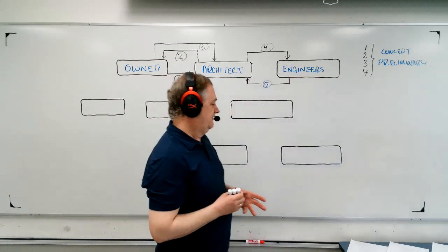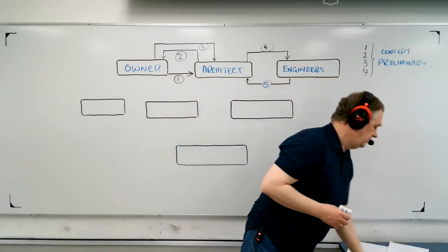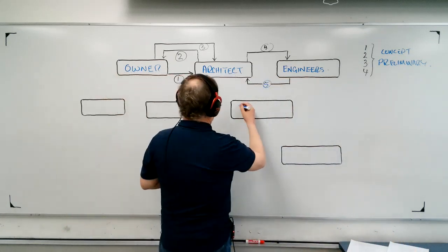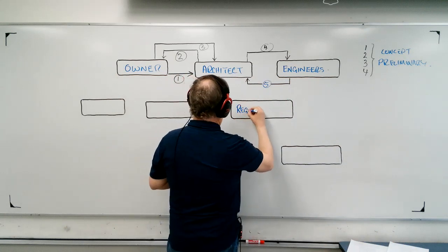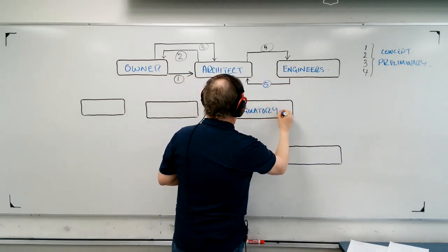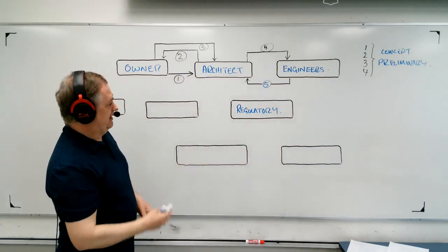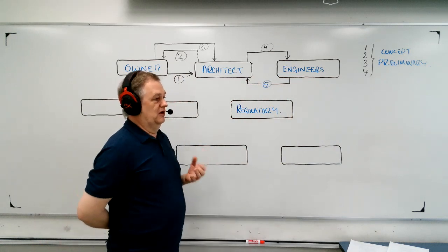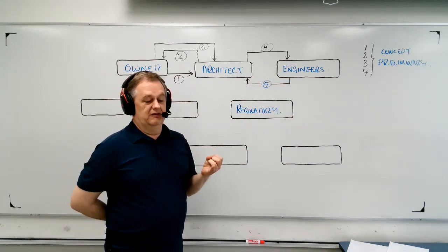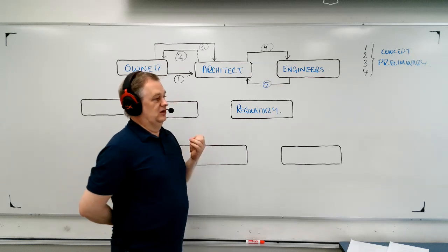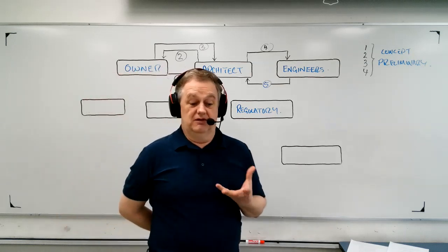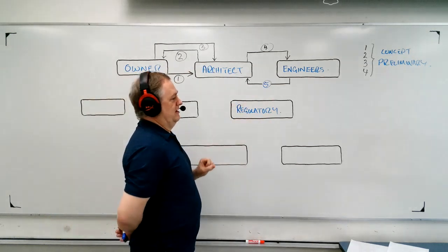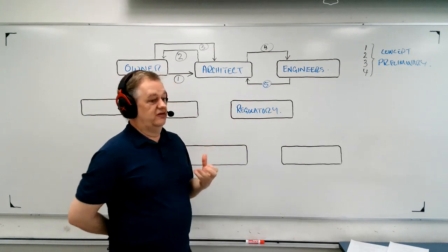And the next thing that we need to look at is, is this building okay with everybody? And so what we call this next step is regulatory. So they have to send it to all the government agencies. They have to look for permits for all of the different things. They have to go to land use to see if the area is zoned for that kind of a building. So there's a whole bunch of permitting processes, not the least of which is, for instance, the supply authority.